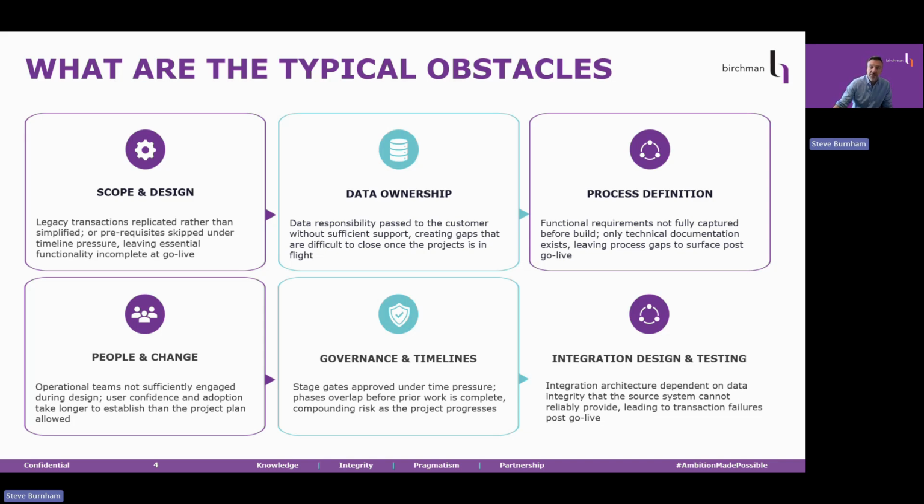Every program has stage gate reviews on paper. What fewer programs have is someone at those reviews with both the information and the authority to say the stage gate should not be passed. When a CIO is under pressure to hit a board commitment, the team is billing against a fixed timeline, and the program team is exhausted, the path of least resistance is to pass the gate and carry the risk forward. This is how Explore ends without it really being finished. And this is how the Realize stage begins on a foundation that's not ready.